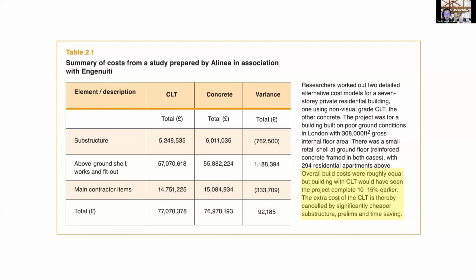But we come into conflict on projects in terms of a lot of contractors don't work with these kind of special timber structures. It's not a conventional choice, and you will quite often be faced with many people along the journey of a project who will say, why can't we make the building out of something else? And they might, at the start of a project, talk about potentially higher capital costs for timber structures. But that can be mitigated by the speed and some of the offsite fabrication that can save time on site and negate those upfront costs.